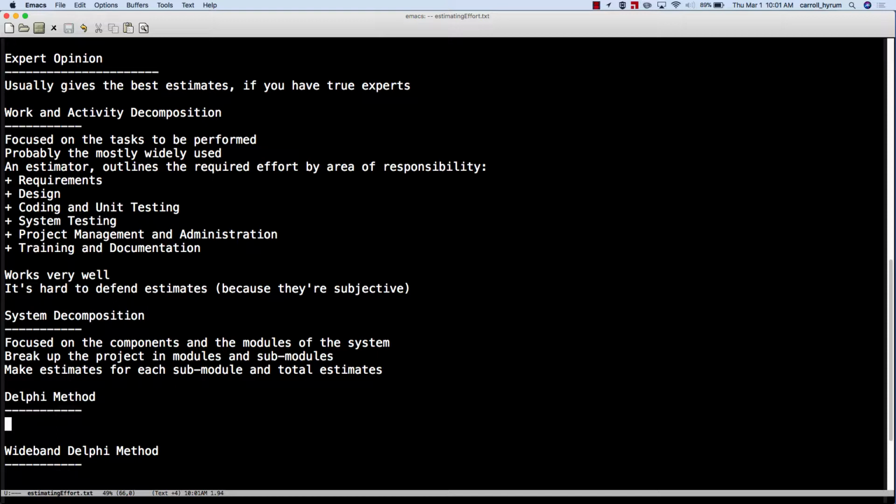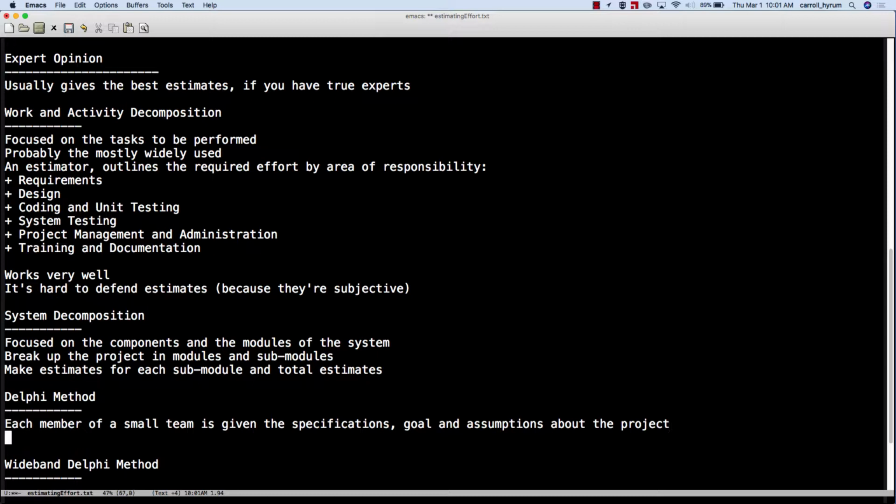And so here's how it works. Each member of a small team, okay, if it's a large team, it's not going to work as well, is given the specifications, the goals and assumptions, among other things, about the project. Okay, so they're given that. And what they do is they anonymously generate an estimate. Okay, and then the estimates are shared